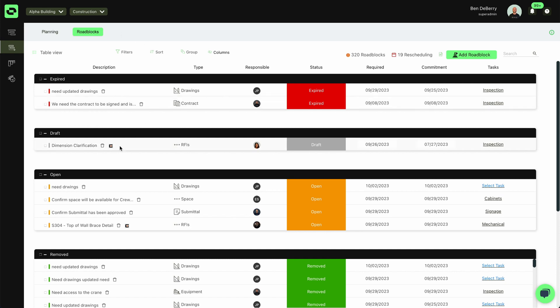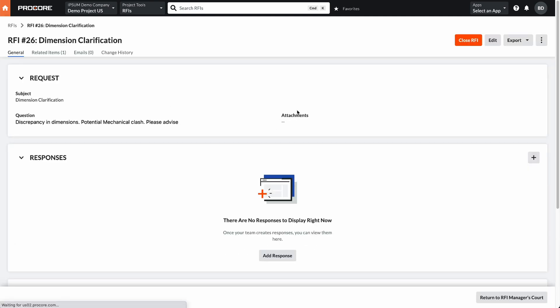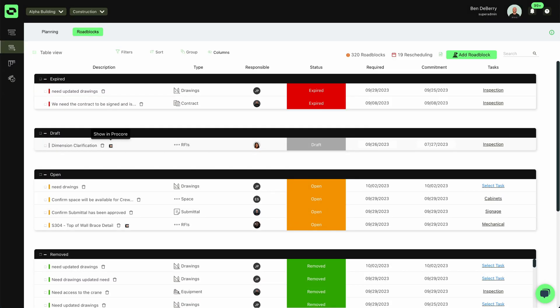Now when it comes to the RFI that we just created, I can see that listed here. I can select the hyperlink and view it within Procore. And I can even go further and mark the status of that roadblock, assign it to a different user and even assign it to a task within my look ahead. This will allow us further insight and to see how our RFIs with schedule impacts are actually affecting our work in the field.